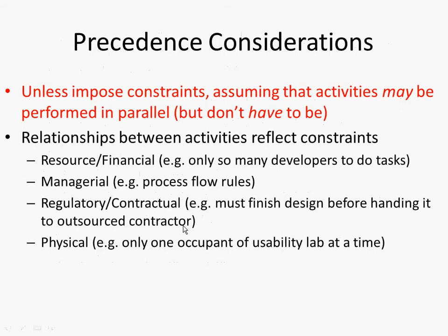It tells us for each task in our diagram, 4 things. The earliest time it can possibly start, given all the things it depends on, the earliest time it can finish, given all the things it depends on. The latest time it could start without risk of delaying the entire project, and the latest time it could finish without delaying the entire project. 4 things.